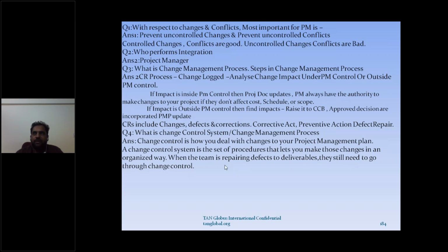So just remember, whenever we plan, we don't plan for defects also. We don't say, out of 6 months, let's keep 1 month for defect repair, make a release, then wait for the defects. Generally in PMP, we don't take that into account. Practically we do it in real life, but here we are expecting zero issues. When the issues come, and if they're impacting a lot of schedule baseline, cost baseline, resource baseline, then we will have a change request, explain why these issues came, and get approval.